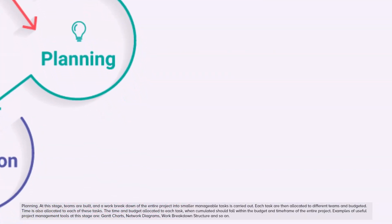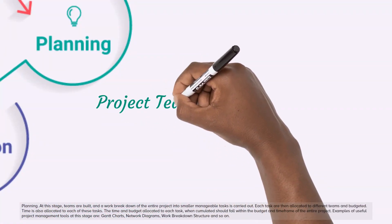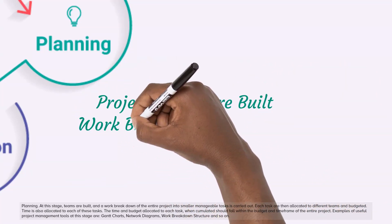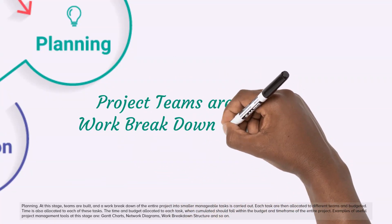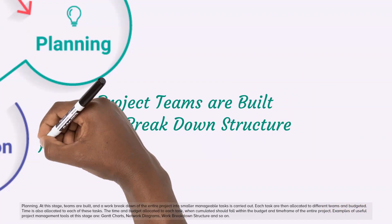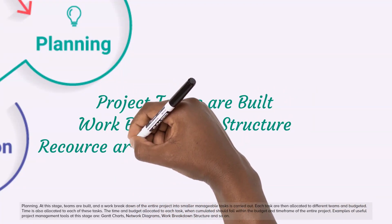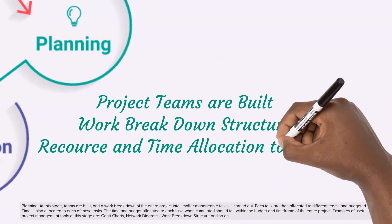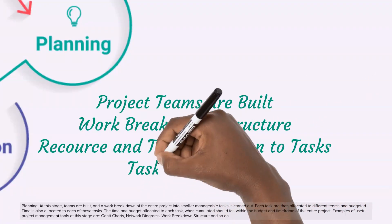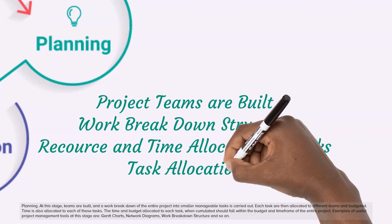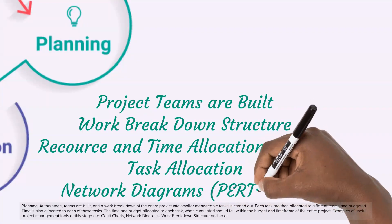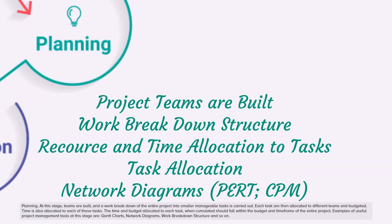Planning. At this stage, teams are built and a work breakdown of the entire project into smaller manageable tasks is carried out. Each task is then allocated to different teams and budgeted. Time is also allocated to each of these tasks. The time and budget allocated to each task, when cumulated, should fall within the budget and time frame of the entire project. Examples of useful project management tools at this stage are Gantt charts, network diagrams, and work breakdown structure.